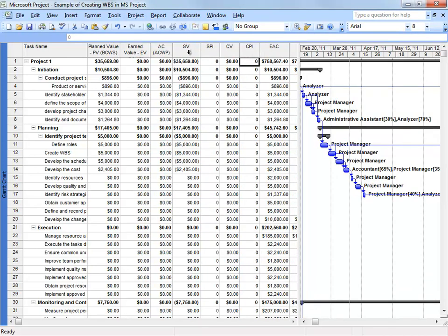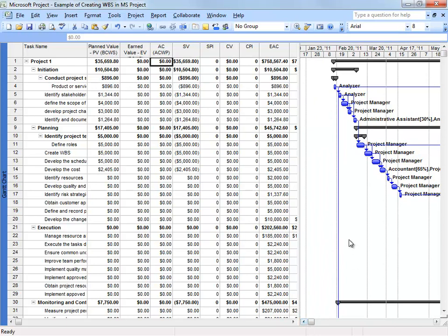So now we have the schedule performance index, the cost performance index. I have the variances in the schedule and cost. I have the earned value, planned value and the actual value, estimated at completion, budget and completion. I have all the values that we were trying to calculate. I have it already been developed by Microsoft Project. So once I have the actual value, which is how much did I accomplish from the task, you will see that it will start changing as we go.